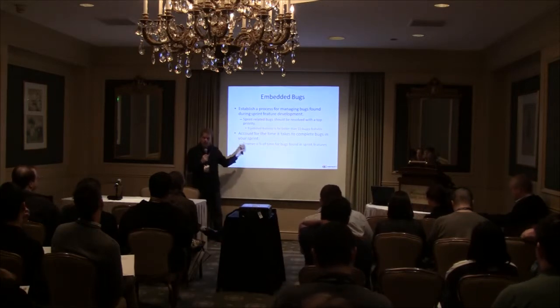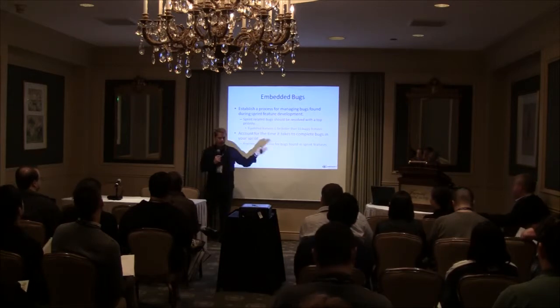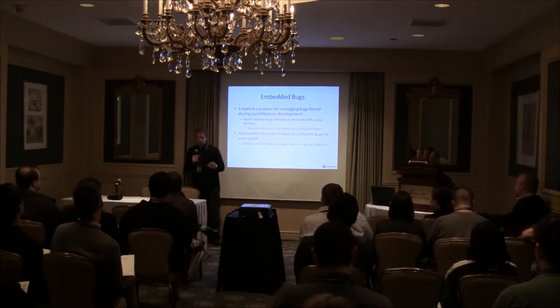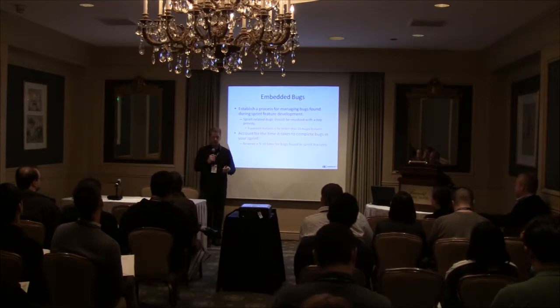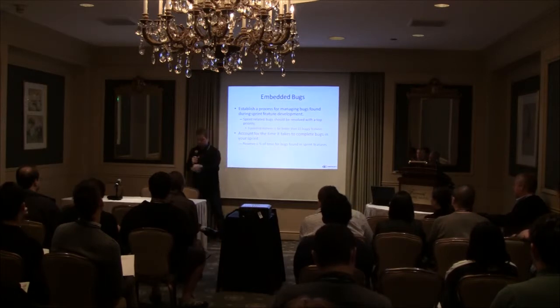Nobody has ever written code, ever, that was bug-free. So if you've got a 2-week sprint, you probably need to reserve at least a day of that 2-week sprint for bugs, at least. And the longer your sprint or the longer your release is, you probably need more time.